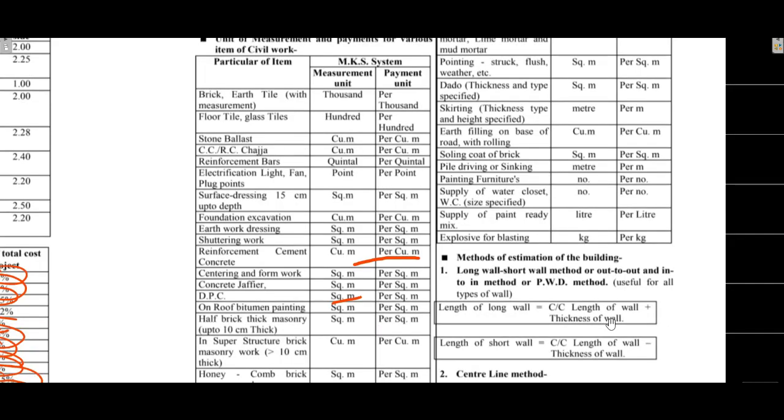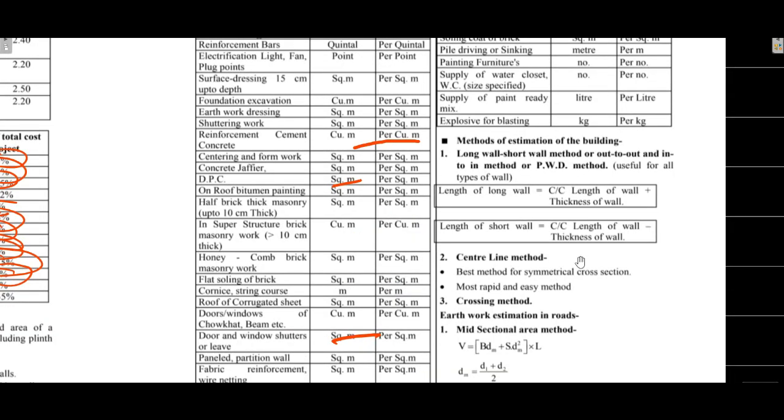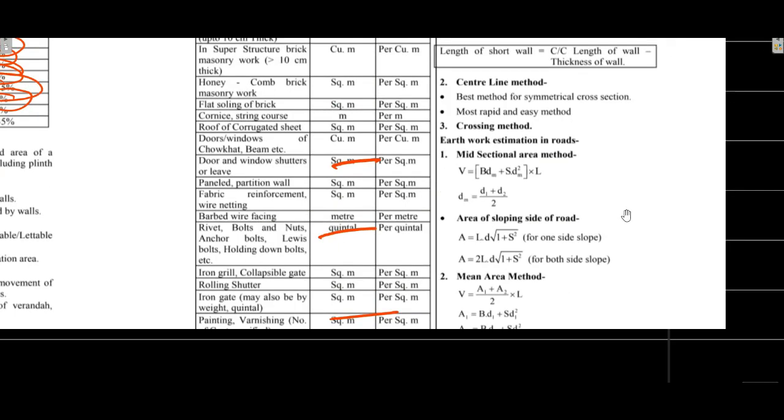Building estimation methods include long wall short wall method and center line method. Long wall short wall method: length of long wall is center to center minus thickness of wall, length of short wall is center to center length minus thickness of wall. Center line method is the most rapid and easy method. PWD uses long wall short wall method or out-to-out method or in-to-in method.